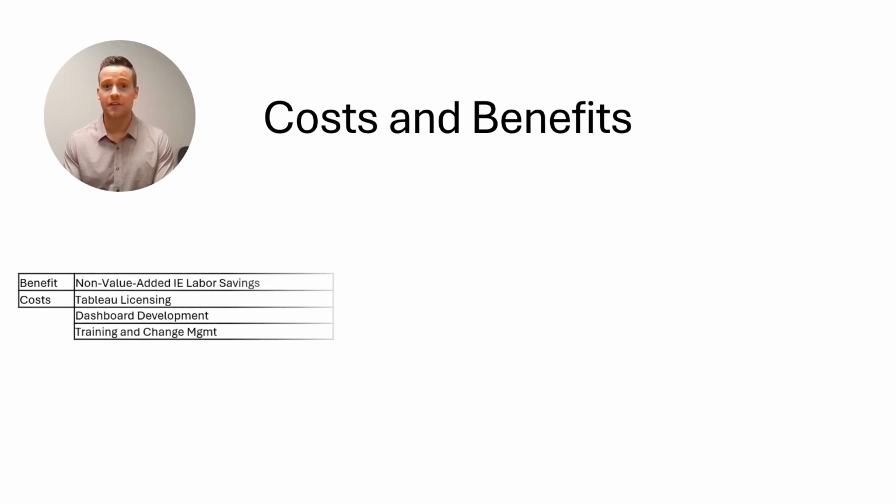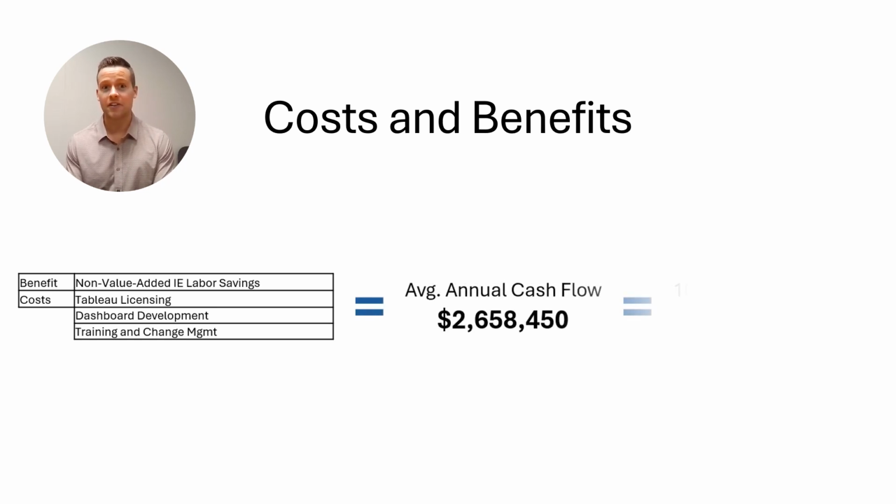The costs of implementing this solution include Tableau licenses, estimated $10,000 annually. The development and integration of the Tableau dashboard with the help of the tech integration team will cost approximately $19,000. And training and change management to ensure effective use of the new system will add another $25,000. The total initial investment for the project is around $54,000.